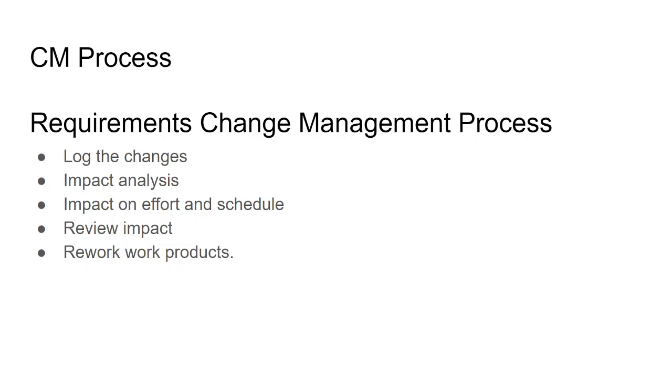And you need to do some changes, so what are the major things that you need to have? First thing is you should log the changes, like what changes you are making, you should keep a record of it. And if you make that change, what would be the impact of it? That analysis you have to do. And impact on effort and schedule. That is, if you are making some changes, whether the manpower you have used to develop that is going to be a waste. If so, you should manage how to overcome that, because once the manpower is used, you cannot take it back. You have to pay those people who have worked. So you should think of it intelligently, and review impact.